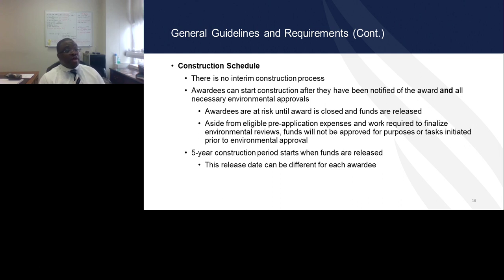Aside from pre-application expenses and work that's required to finalize environmental review, grant funds will not be approved for any purposes that were initiated prior to environmental approval.